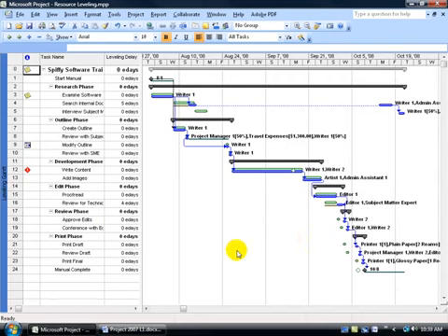First off, notice that we have two different colored bars over in our resource leveling chart. Everything that's in green is what it was before it was pre-leveled, and then the blues are what it's like after it was leveled. So coming up to the top, you can see that there's not any change with the examined software. But when we go down to Search Internal Documentation, we have the pre-level. When you hover over it, it gives you the original date and times, and then you have what it was like after it was leveled.